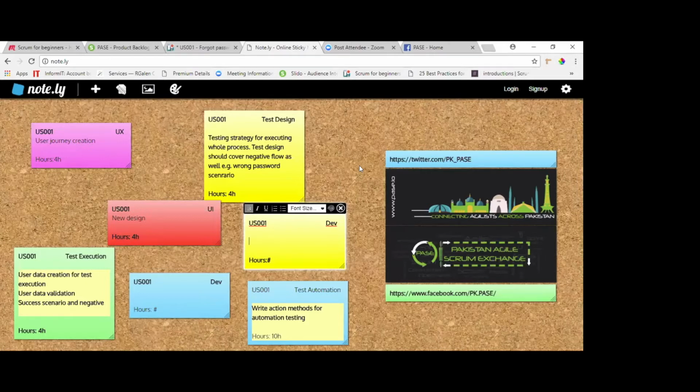That's the reason we are adding those man hours on the task, so the development team can understand what is required from them, and then based on that we fill our sprint. So let's say we have 4 days and 40 man hours in a week, we can fill that capacity using those estimated hours.